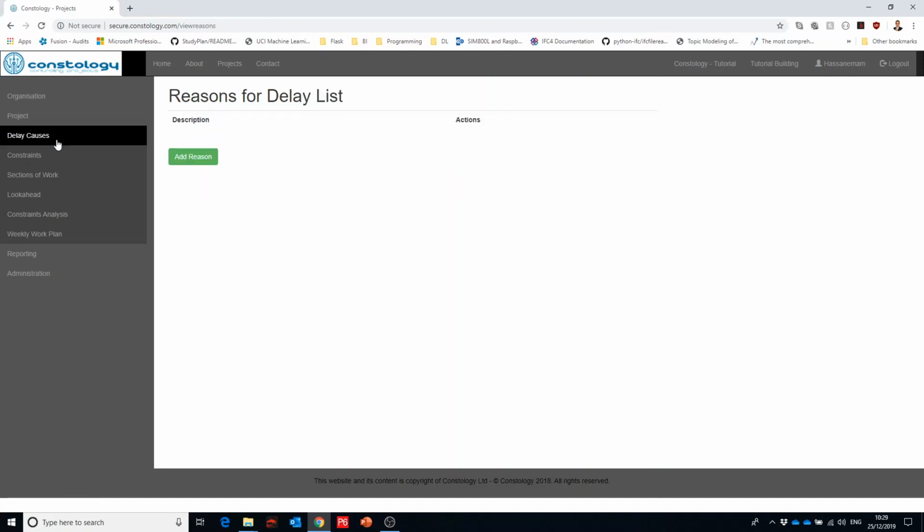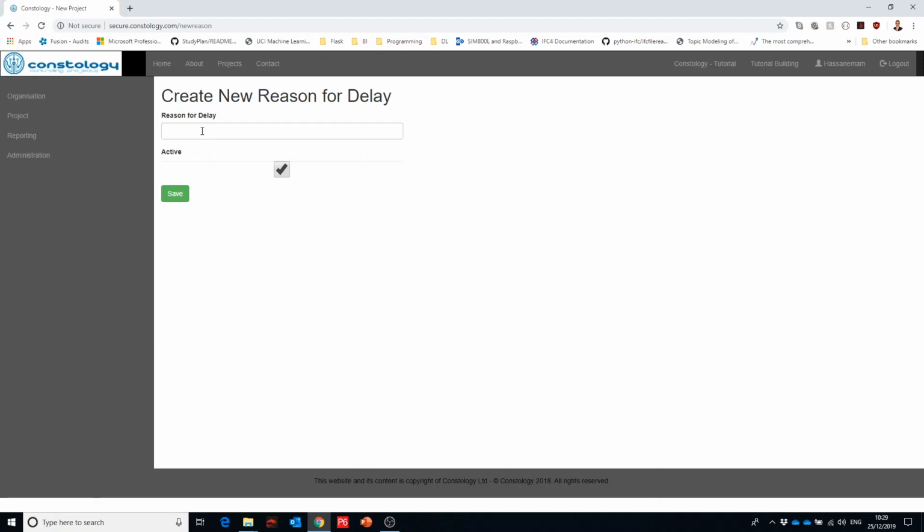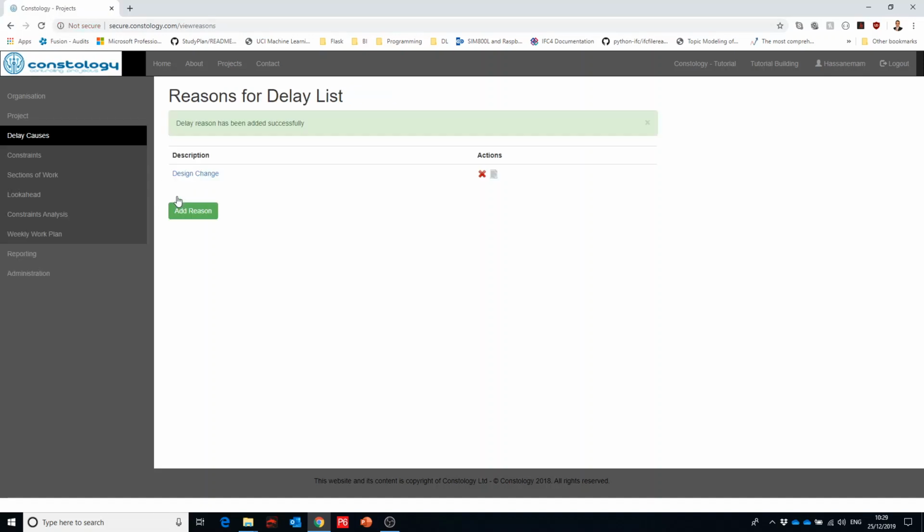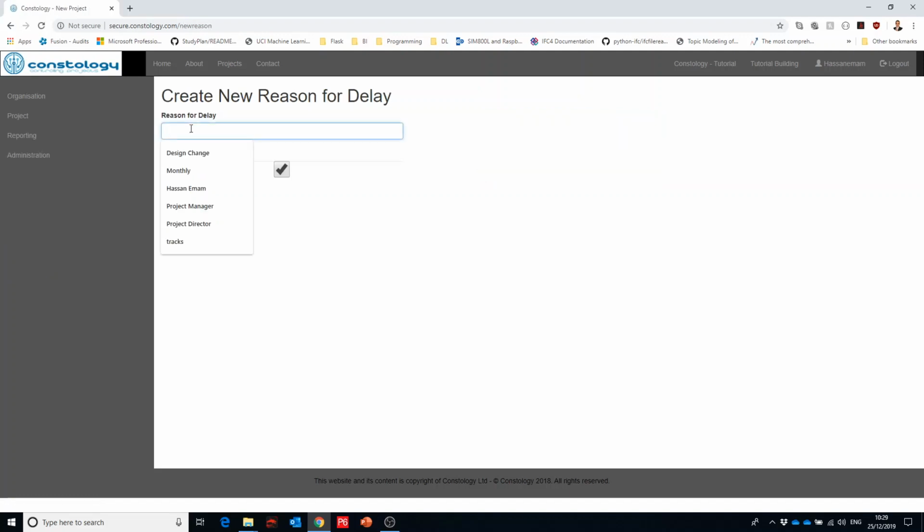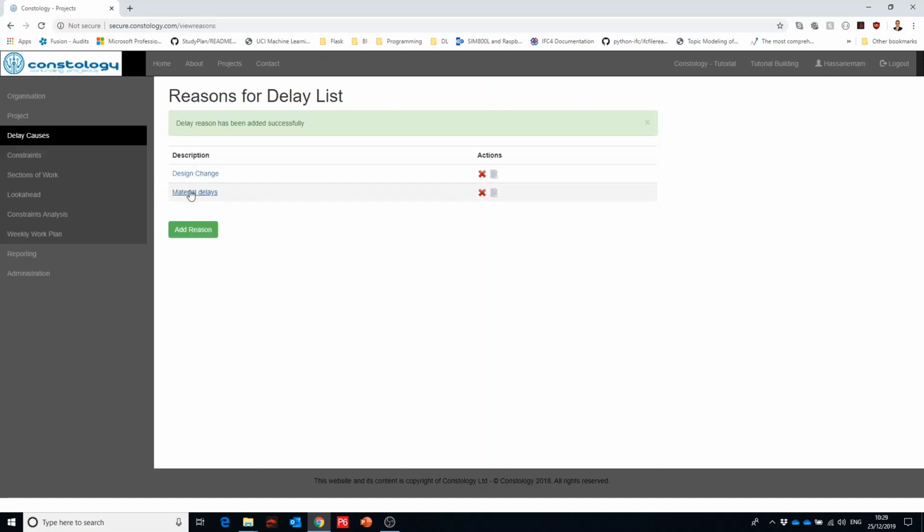So you just click on the delay cause and you can just add reason for delay and say, let's say that we'll have design change. That's a good one, and we keep it as active, and then we have it in the list. Say we need to add another one. Let's say material delivery or material delays. Yeah, all right. So these are two reasons for delays that we have defined.